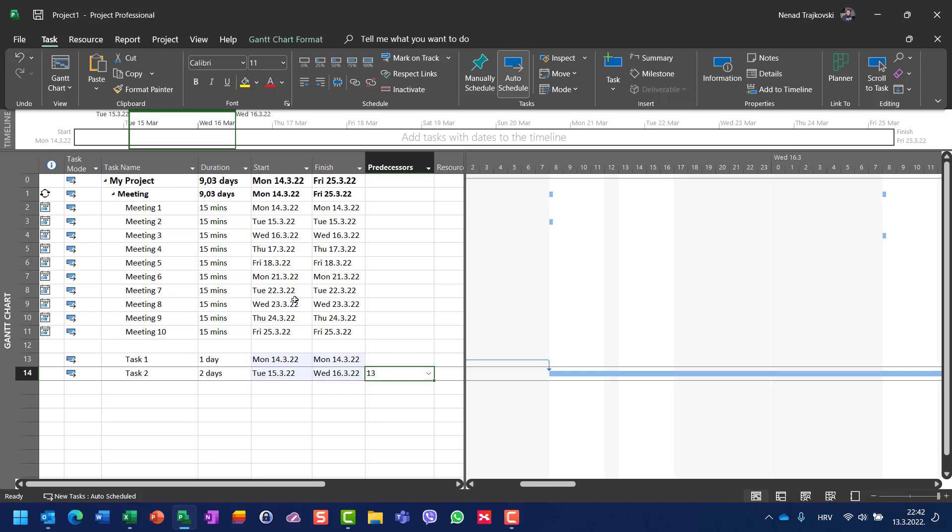Because 15 minutes are not something which I will miss in my Task 1—I can work harder or whatever to make up those 15 minutes. But if I do that, as I showed you in my previous example, if I connect Task 1 with each of those meetings, the task will start at the same day but 15 minutes later. It will finish the next day or next days, and the last day will last 15 minutes because those 15 minutes are missed because of the meeting, and the meeting was a predecessor.